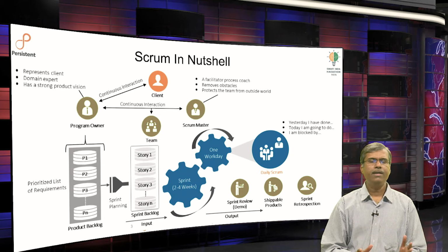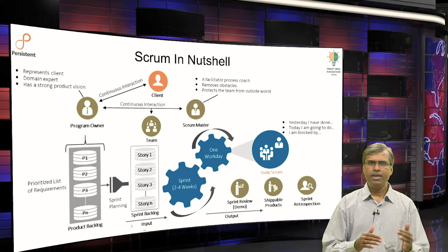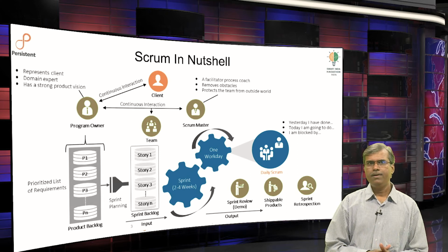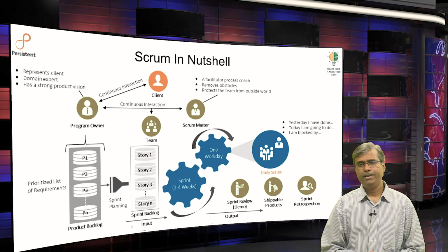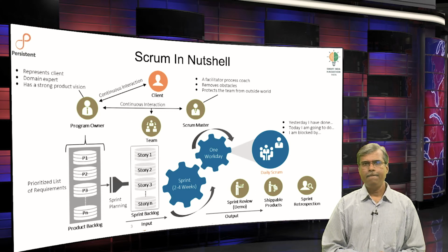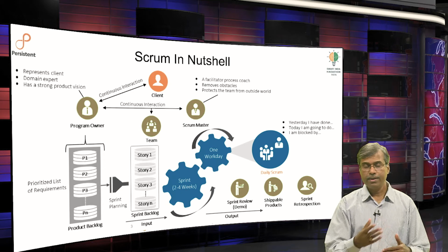You split the requirement so that the complexity is broken down, and you have a better chance of assessing its complexity and estimating and sizing it, right. So, all such complex stories are then broken down to make them simple enough and tangible enough to deliver, and the team would then estimate it.